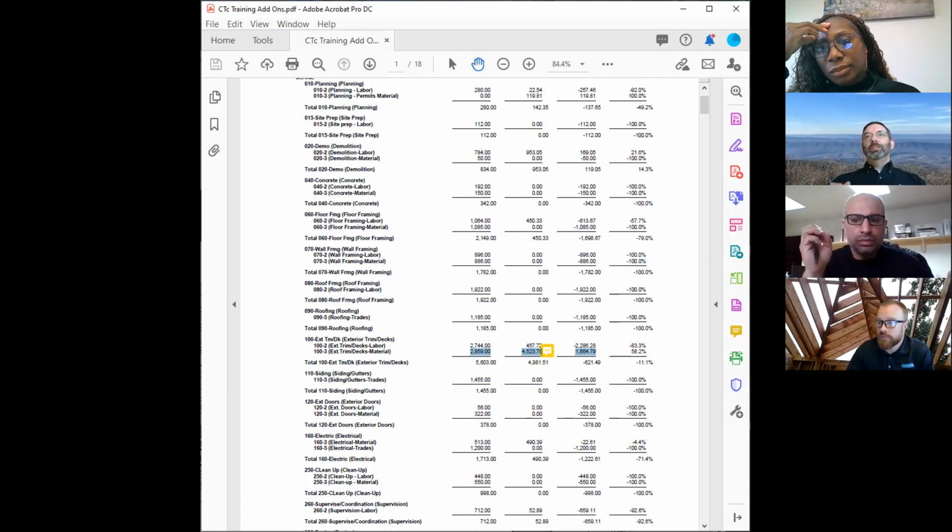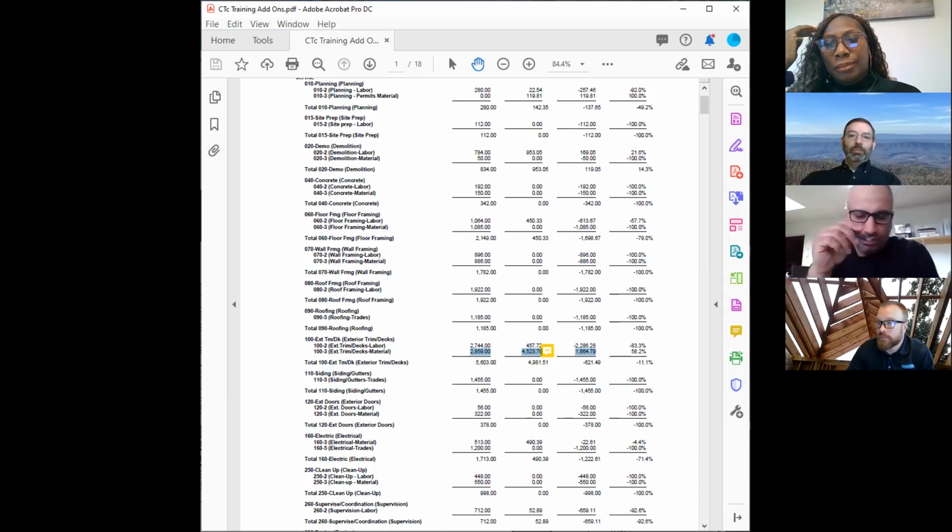One of the things that will make your job cost inaccurate or lag is if you're sitting on a pile of coding. So if Beth has sent in 15, 20 things to code, and it takes 2 or 3 weeks to get those coded and put in the system, your job cost will look better than they are because the coding has not been assigned, given to Beth, and entered into the system, right? So staying on top of your coding really helps keep things current. It also means you don't have to remember as much when you're assessing your job cost.